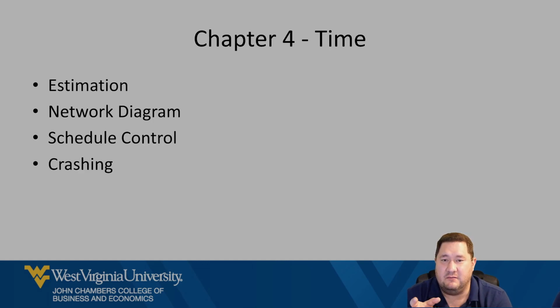That way we can try to catch up, and we can do that, let's say, for a week, and maybe that gets us back on schedule. Because my example was we were essentially 3 weeks behind. If we estimated 3 would be the tear out. Well, it took 6, so now we got to try to make up these 3 weeks.